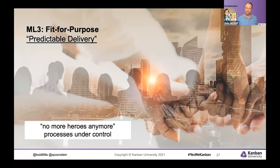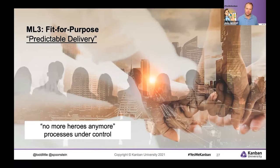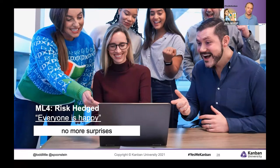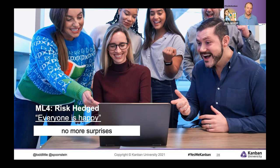As you become more mature and develop predictable delivery, you really become fit for the customer's needs. You don't have heroes anymore — you have a process that is under control, with things flowing through the system reasonably well and predictions made with some level of quality. If you advance beyond that, you move into what's called risk-hedged: playing with risks at the organizational level, triaging incoming demand, and making good decisions about what to do next. The result is predictable delivery with no more surprises — a big change that typically produces a lot of delight in the organization.